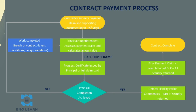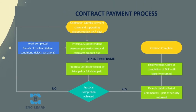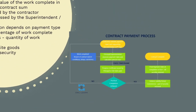This process will happen monthly until practical completion of the project is achieved. On practical completion, the defects liability period will commence, and part of the security withheld by the principal will be returned. At the end of the defects liability period, the contractor will then need to make a final payment claim — this will be the last shot the contractor has to claim under the contract — and the principal will also return all the security they are holding for the contractor.